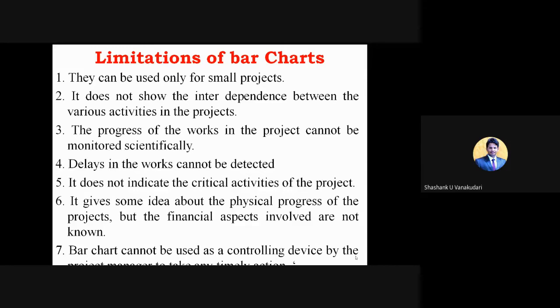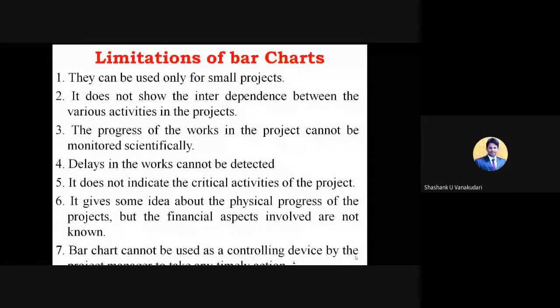Here it cannot show the critical path as well as the critical activities, and it gives some idea about the physical progress of the projects, but the financial aspects involved are not known.